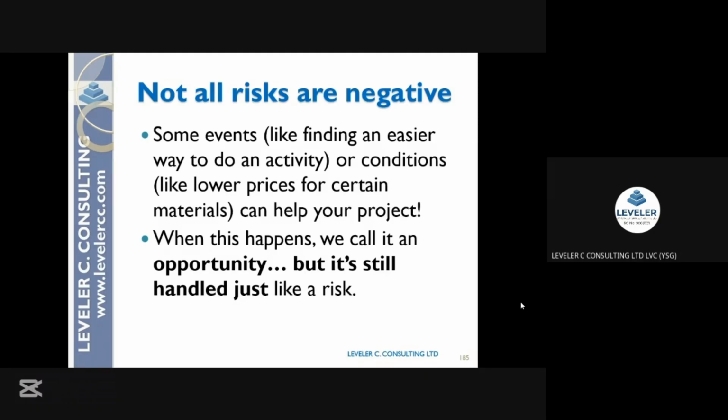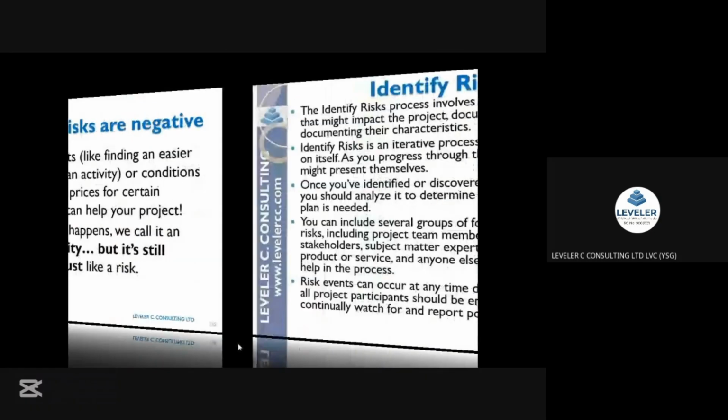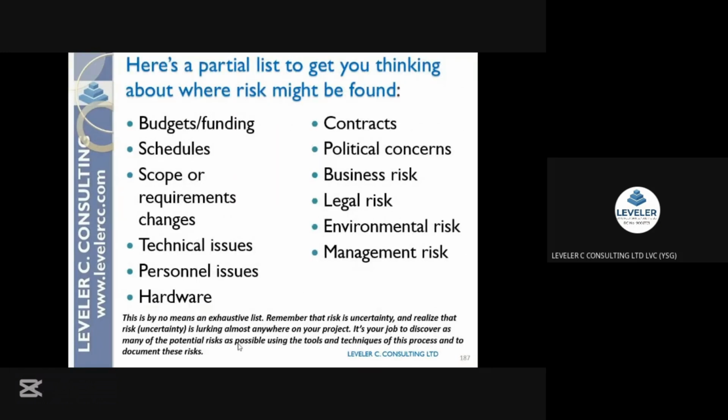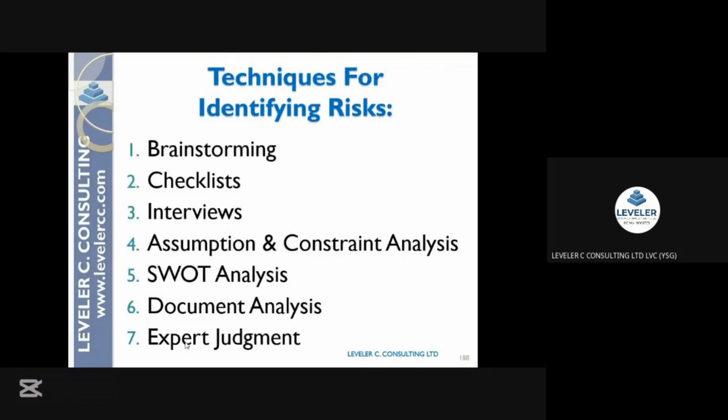As we build, we meet rock. We decided to blast that rock, and we got the tons of granite that we needed. In fact, we even got extra. It impacted our schedule, but it saves us cost. That's a positive risk. Please, when you think of risk, don't always look at it from a negative aspect.